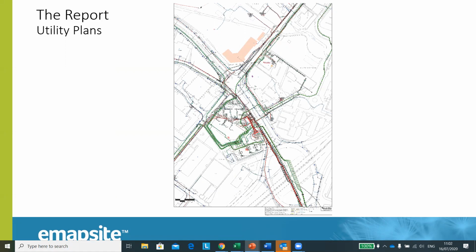So for instance, you've got a giant field. The plans will help you know that most utilities are concentrated in the left-hand corner, so you know that's where you need to go and look at the starting point. That's where they're useful in that scenario. So they're only indicative plans, but in the planning stages, if you want to just find out, okay, could this area possibly support a new development, etc. And as a basis for cost savings in a physical search, as I said, but you would always want to team them with a physical survey if you can.